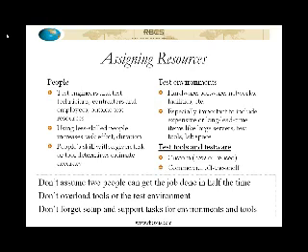Be careful not to overload the tools of the test environments. That will have a tendency to produce a very high rate of false positives, failures that are actually just natural consequences of having too many people trying to use this tool at once, or too many people trying to use an environment at once. So try to avoid doing that. Don't build that into your estimate.